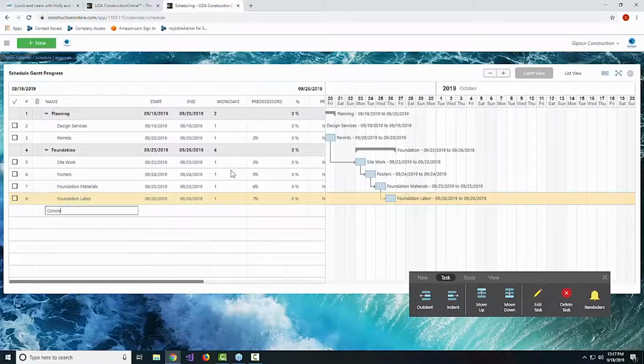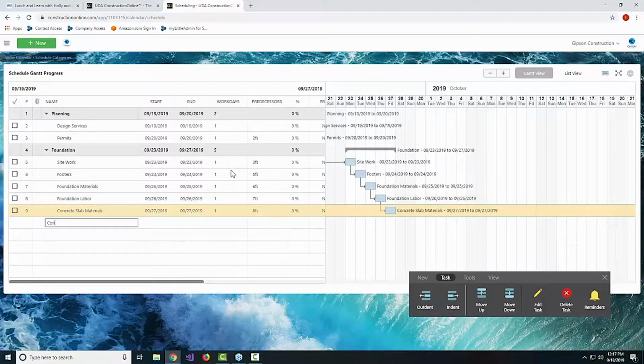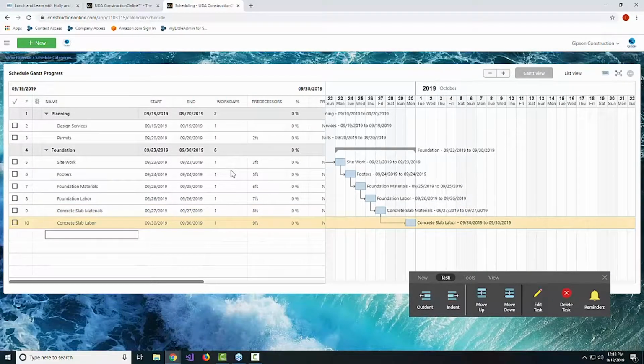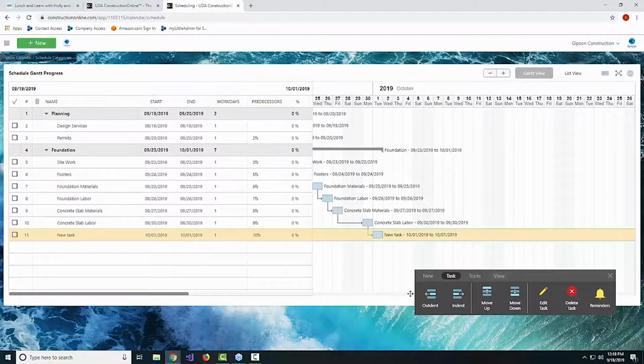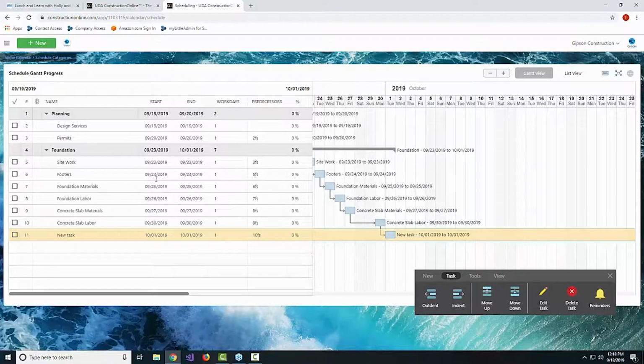and calendar event B. Now, we probably won't get too in depth in terms of discussing the predecessor relationships today. Do keep in mind, though, that there are a few different ways you can connect tasks. For instance, we're looking at a finish-start relationship, which basically reads, well, when this previous task is finished, start this task. You can also set up things like, well, these two tasks always start on the same day. Makes a lot of sense for something like a delivery task that would then key into an actual construction task. Mm-hmm. Yeah, that's exactly right.